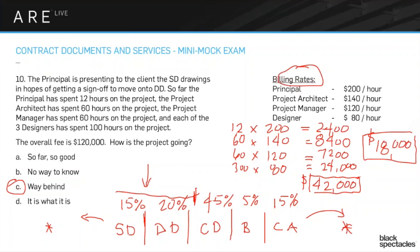An audience member notes the project is way overstaffed, and another asks whether overhead and profit should be included in billing rates. Yes — nobody is actually being paid $200/hour. Those billing rates cover salary plus insurance, rent, overhead expenses, and profit. All of that gets built into the billable rates.